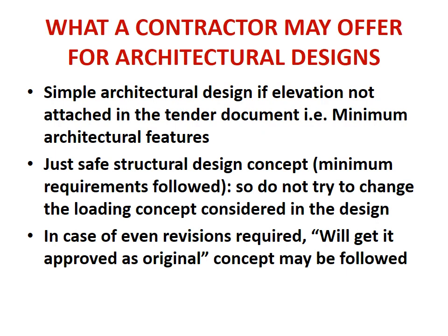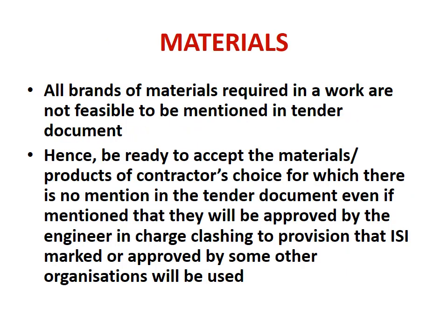And then in case revisions are required, suppose there is some revision required in the structural design, then it goes to the contractor. When you ask the contractor to revise it, the contractor may insist that no, it is okay as per the design norms, and then he will come again saying the original is okay. So that may be there. So it's quite a cumbersome process.